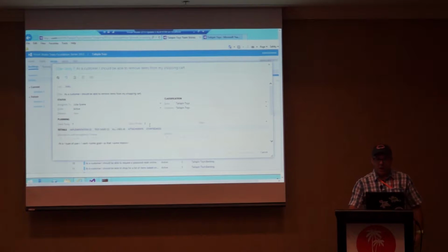It's a gauge. A lot of people want to use particular hours, and story points can equate to hours. I've worked in organizations where one story point equates to 3 to 5 hours, 2 is 6 to 10 hours, 3 is 11 to whatever, and so on and so forth. But we don't care about the hours right here, because when we go to track our hours, we're not tracking them on stories, we're tracking them on tasks associated to the stories.